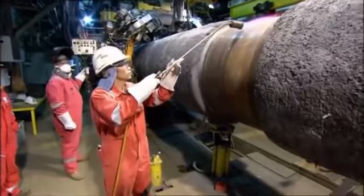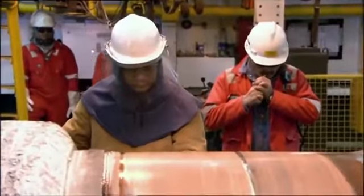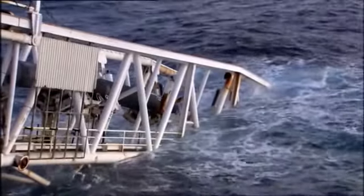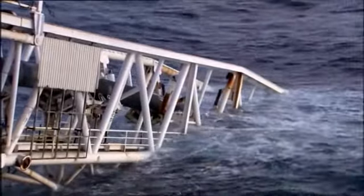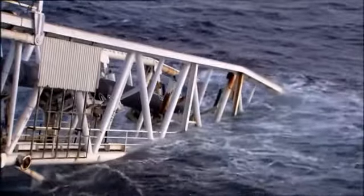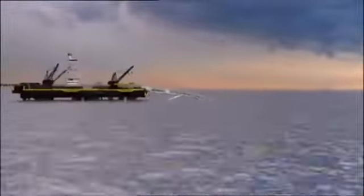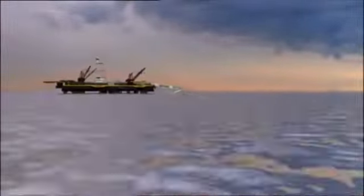Inside, the pipe comes to a standstill. The crew can only wait for calmer conditions to return. It's a costly delay, and the stormy seas are doing the pipe no good at all. It might be 1-inch steel, but the pipe still bends. It curves twice on the way down, in an unsupported S shape. If the sea is rough, the bends could become overstressed, causing damage to the structure of the pipeline.